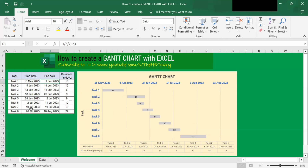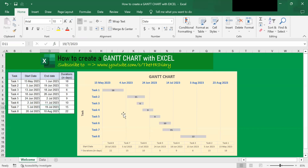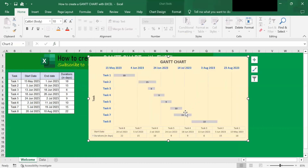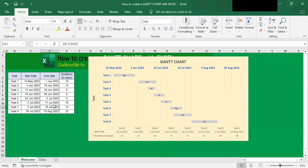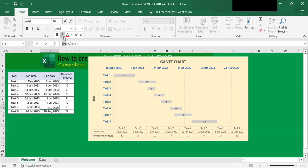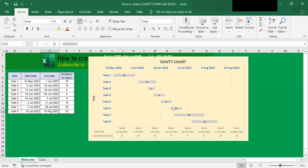So if I change the start date for task 7 from 10th July to 5th July, let's see what happens. So if I change the end date for task 7 from 19th July to 30th July, you will see it stretches and the duration stretches. So if I change from 19th to 30th, the duration you'll see — for 15 days when I hit enter, it will change to 26 days. So here it automatically updates to 26 days as well.